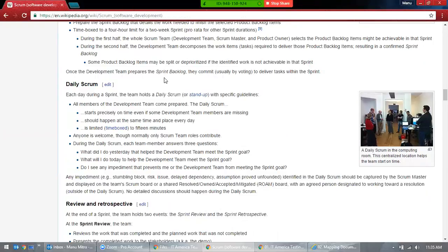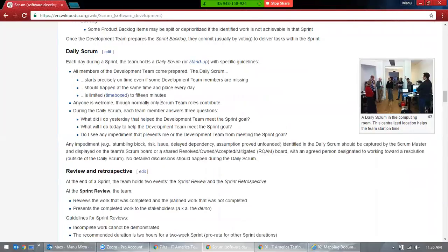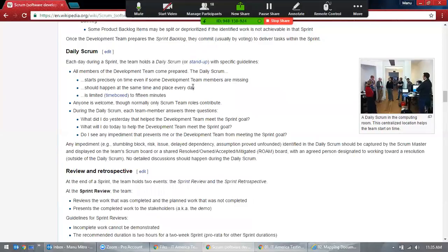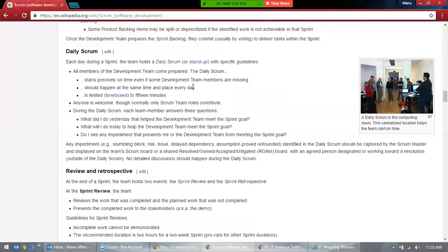Okay, let's move to the Scrum. We have the daily Scrum. The daily Scrum is a time box unit of 15 minutes, normally 15 minutes. What do we discuss in this? What have you done yesterday? What are you going to do today? And are there any impediments, anything that's stopping you from doing the work?